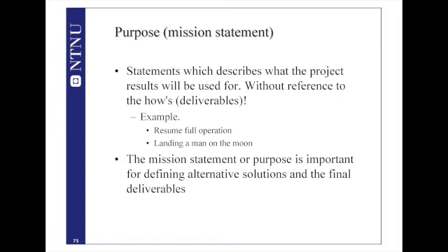Another mission statement could simply say: resume the full operation in the shortest period of time. Let's assume that you have a facility and the facility was damaged due to fire, due to an accident or anything. So what will be the main purpose of your project? You don't have to say lots of qualitative statements. No, it is simply, I want to resume full operation in the shortest period of time. So the resumption of full operation is a mission statement.